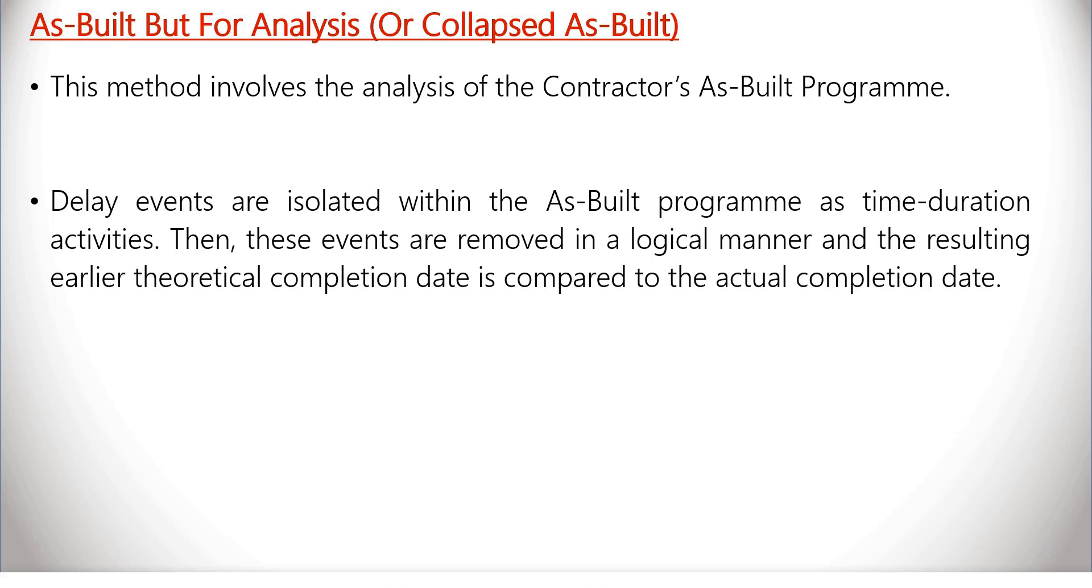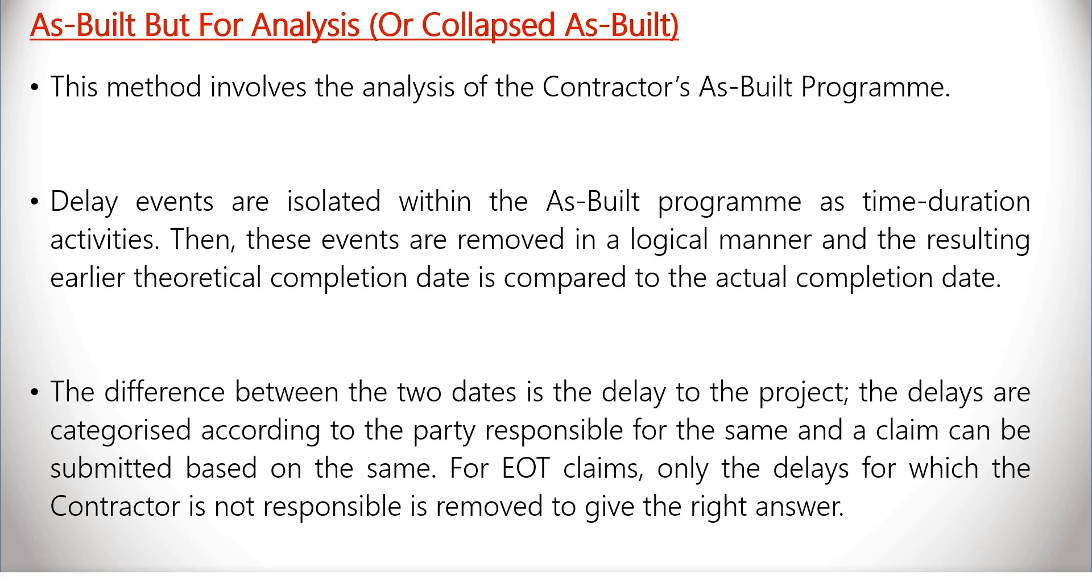The difference between these two dates is the delay to the project. The delays are categorized according to the party responsible for the same and a claim can be submitted based on it.